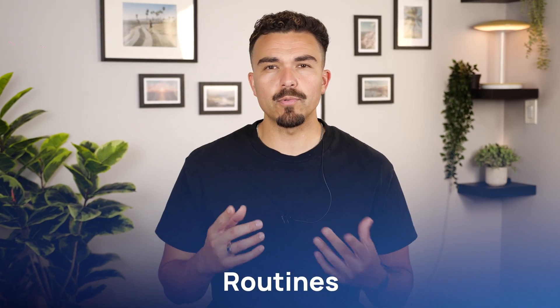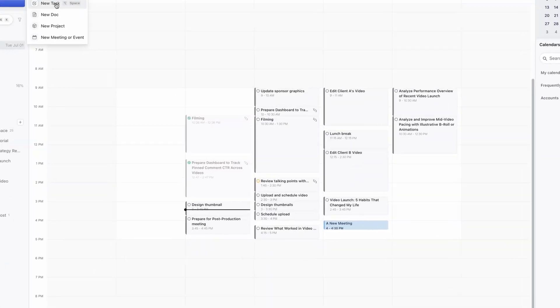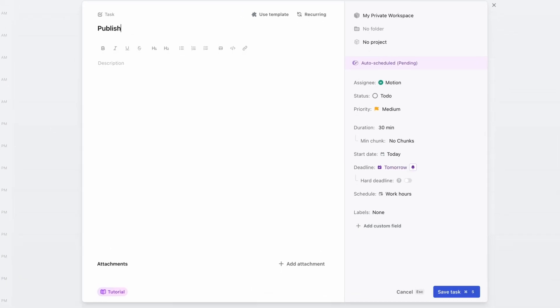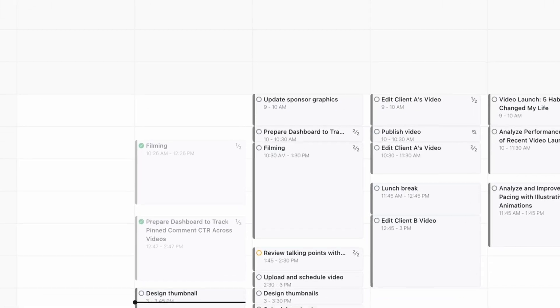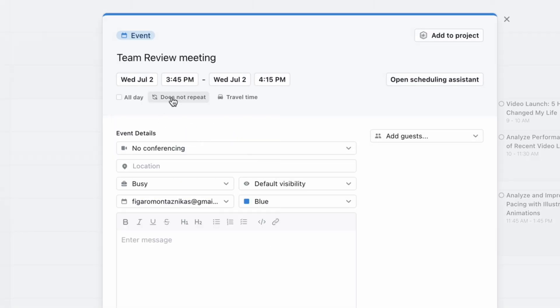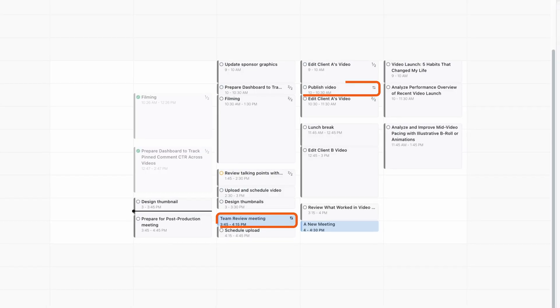Next in the Motion app tutorial, let's talk about routines — because most teams have tasks that repeat week after week. In Motion, you can make any task recurring so it shows up automatically in your calendar. For example, I'll add Published Video every Thursday at 10am, and Team Review Meeting every Wednesday. Motion adds these into my calendar every week.